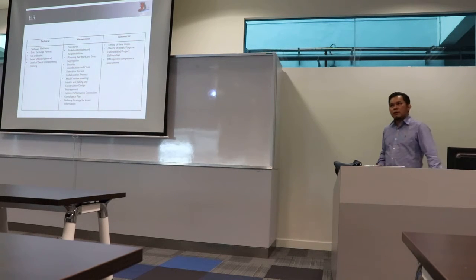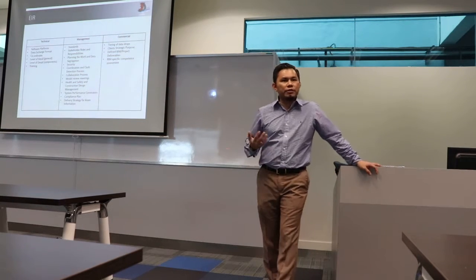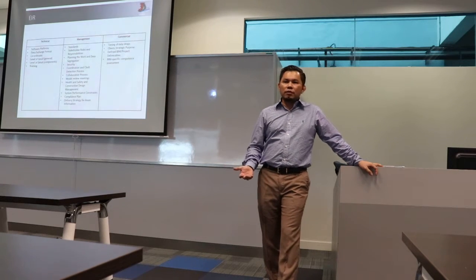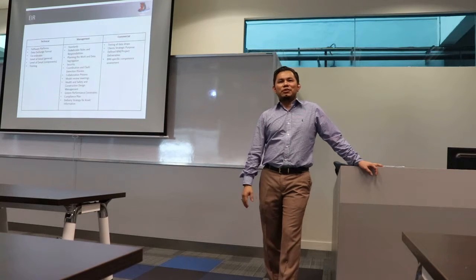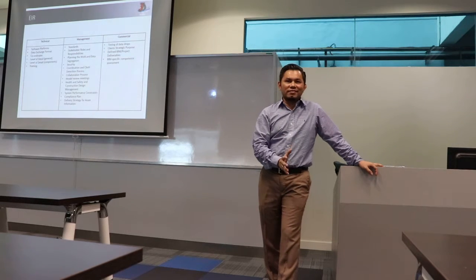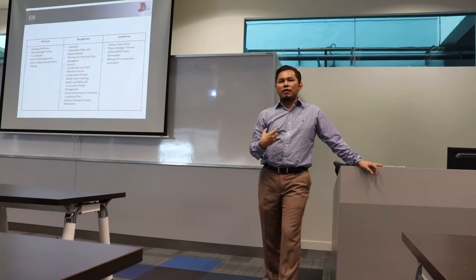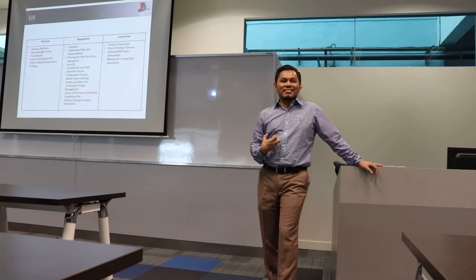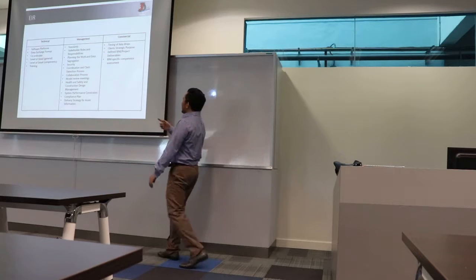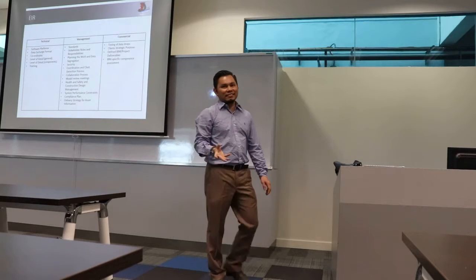I have experience from when I was working with Samdabi. I was the BIM technologist there. When we were there, we put in requirements for a BIM project. The mechanical engineer said yes, we can do it, no problem. So they did everything, but they did not submit. They just showed it. Because they said that if you want this data, you need to pay me 800,000 for all the data that I've created, because the EIR is not clear about deliverables. We failed in that part.